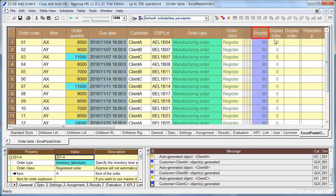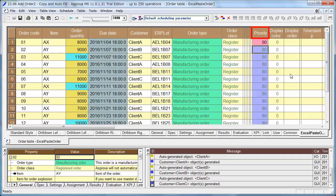As we want to start order 01 as early as possible, please set the priority to 90. Also, set the priority of order 02 to 90.